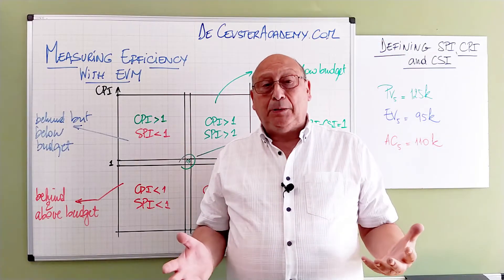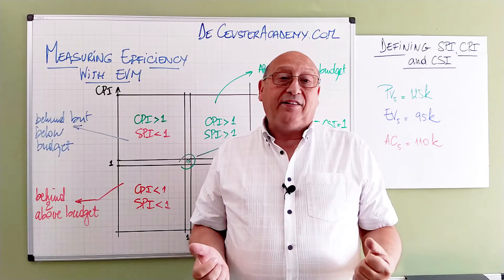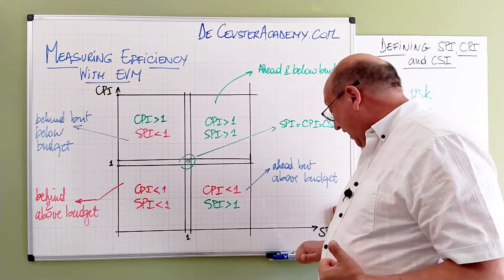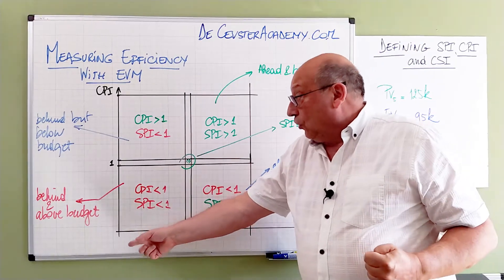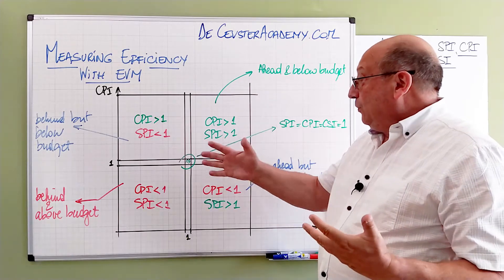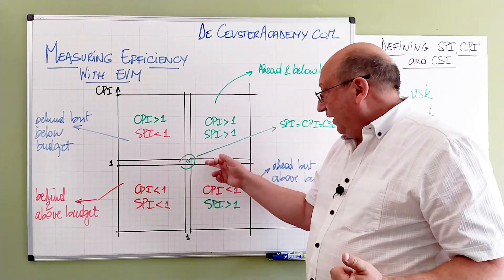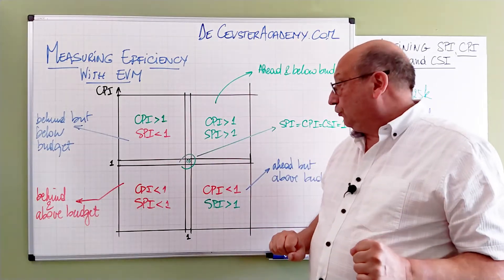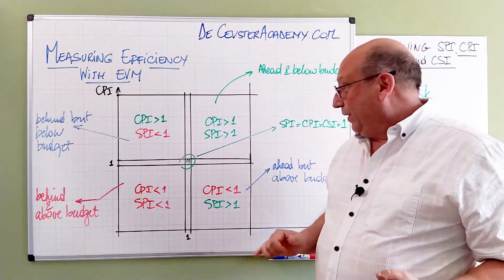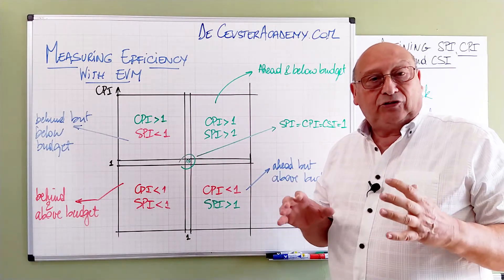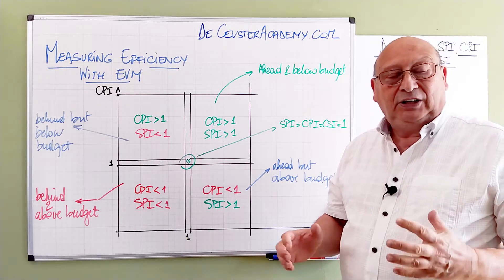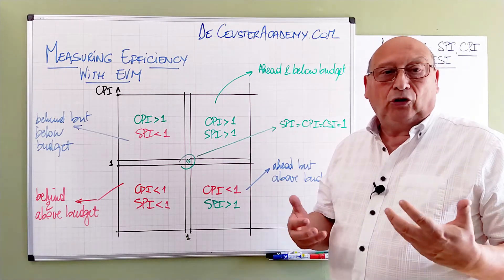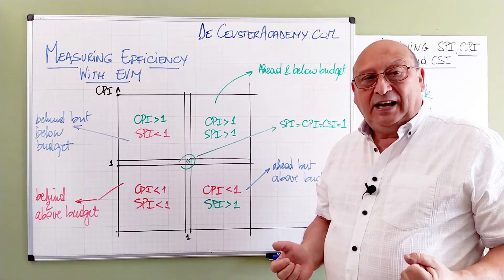We can look at the combined effects of SPI and CPI in a matrix. On the horizontal axis we have the SPI, and on the vertical axis we have the CPI, creating four quadrants. The most important reference point is where the SPI equals one and the CPI equals one — the cost schedule index is also equal to one, which means we are on budget and on schedule.